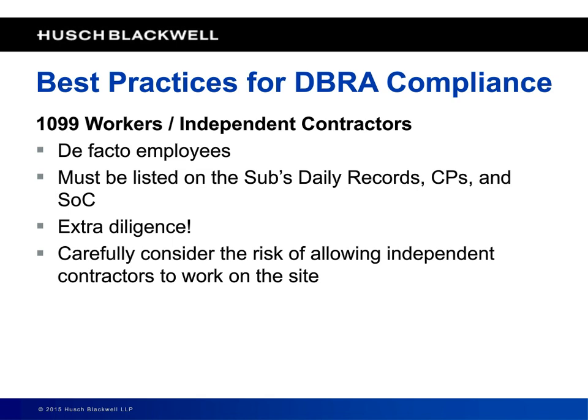You can't say, oh, those guys aren't my employees, they're independent contractors. Wrong. If they're taking direction from that sub, they need to be listed on that sub's daily record as well as on their certified payrolls and statements of compliance. If somebody is insisting that they don't have employees, that they only use independent contractors, again, my experience has been they're not doing it for a proper reason.